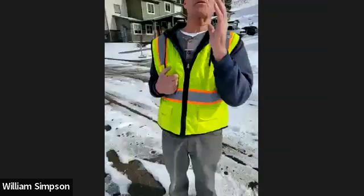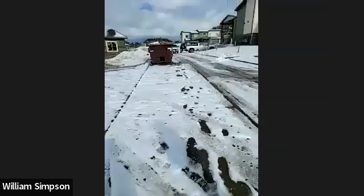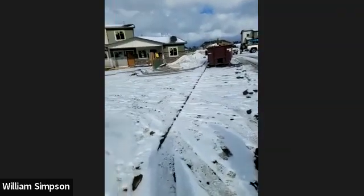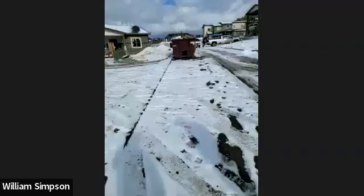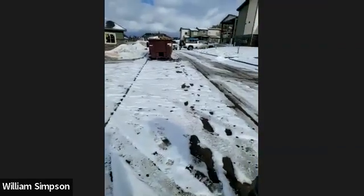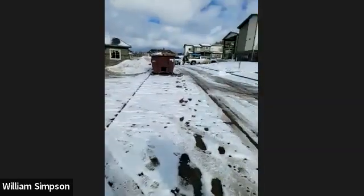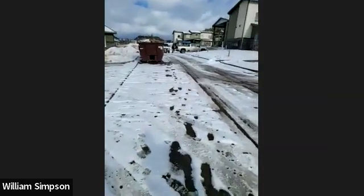Commercial windows, we don't have a flange. He said the difference is in the commercial windows, there's not a flange like on the residential windows, so it's different. I can see that. He says the residential is a lot easier to seal because of the flange. Gotcha. And we have been doing the blower door test and that sort of thing as we go along. No issues there. These last two buildings are scheduled for February 10th and 11th.